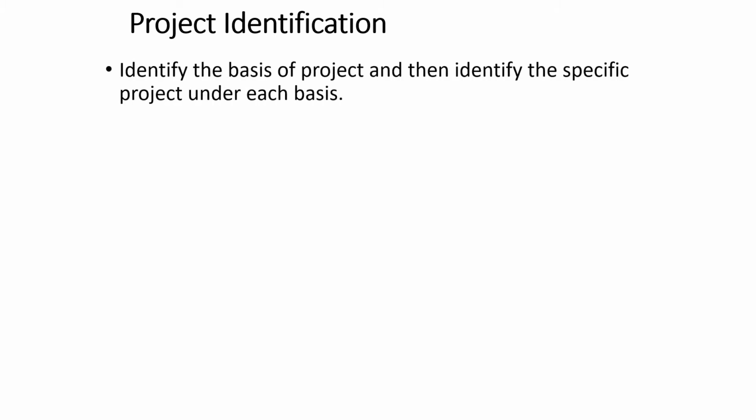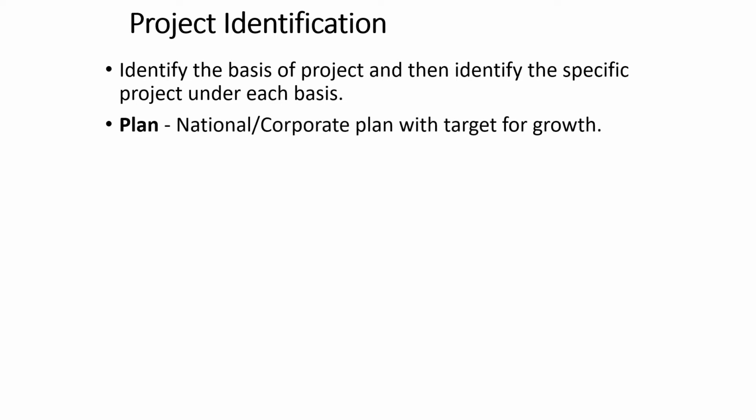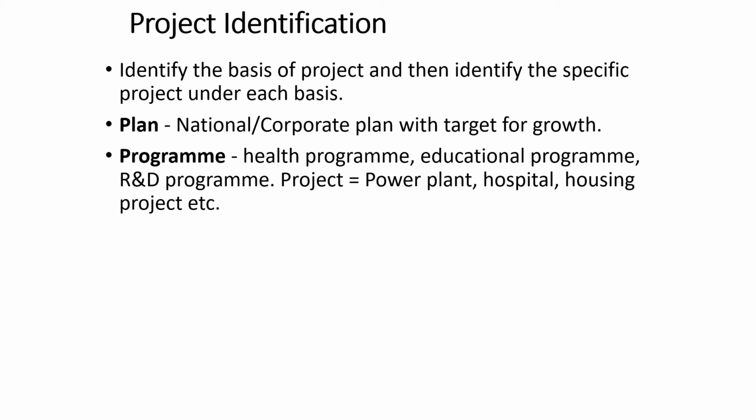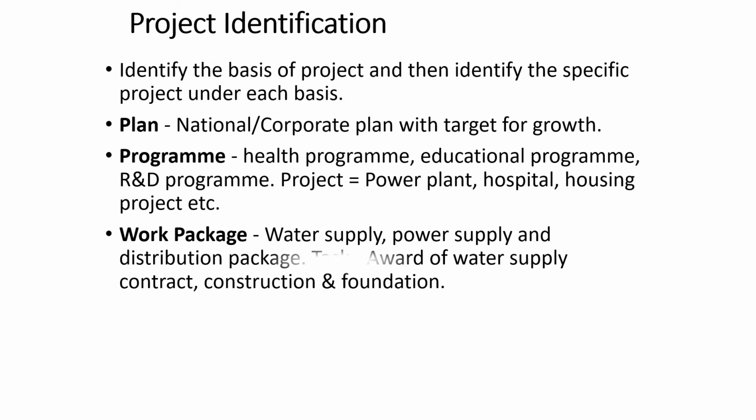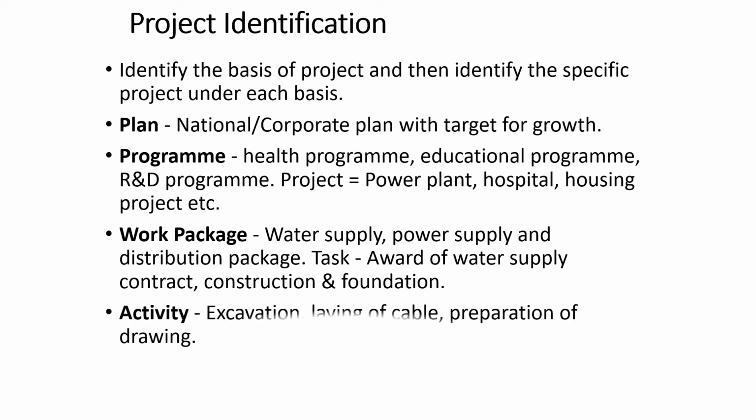The purpose of project identification is to develop a preliminary proposal for the most appropriate set of interventions and course of actions within a specified time and budget frames, to address a specific developmental goal in a particular region or setting. Investment ideas can arise from many sources and contexts. It provides guidance regarding setting project objectives and reviewing alternate approaches to solve a given development project. It emphasizes the involvement of stakeholders from the outset of the project identification. A logical framework is introduced as a tool for project formulation, appraisal, and management.